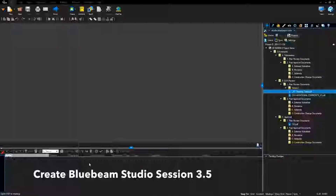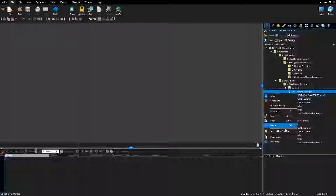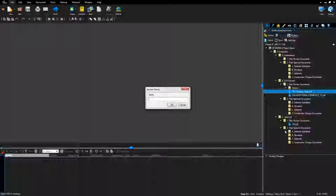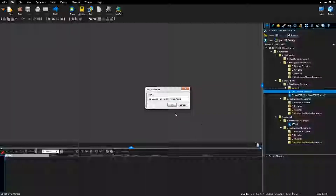Create Bluebeam Studio Session: right-click on the PR tracking table. For increment files, select the increment PR tracking table. Click Add to New Session. Name the session: Office, underscore, application number, plan review, project name. Click OK to create session.